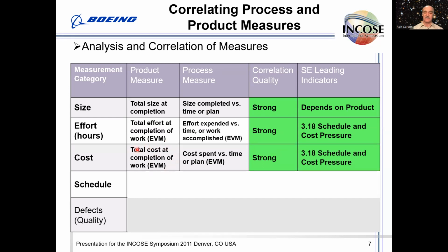One caveat, which I identified in the prior paper on performance-based earned value, is we need to not neglect the cost of any rework, so that if there is rework on anything, that cost should be borne by the work package that did the original work, not some new work package. That would disguise or hide the actual defect in the execution. So one just needs to be careful of any rework, how that cost is accounted.